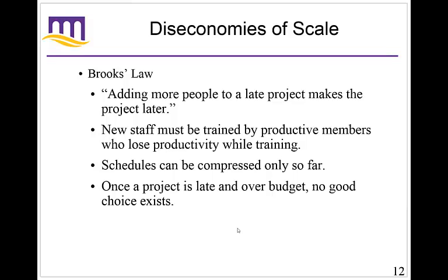So he hired more people, but the project took even longer. And then he hired more people, and they had to delay even more. What he realized is that more and more software developers, so he kept hiring all these different software developers and adding them to this project, actually made the project take twice as long. And it did. It took twice as long to finish. So this is a diseconomy of scale.